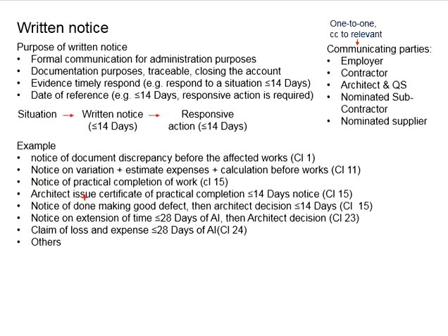Another example is when you have finished making good the defects. You send in a notice to the architect, and the architect shall make a decision within 14 days. This is a typical situation with the date of reference here. If you do not send in the notice, this will not trigger the evaluation by the architect. You are deemed not to have made good those defects yet. Before you complete making good the defects, the retention fund will not be recovered. There are consequences, so this shows the importance of the written notice.